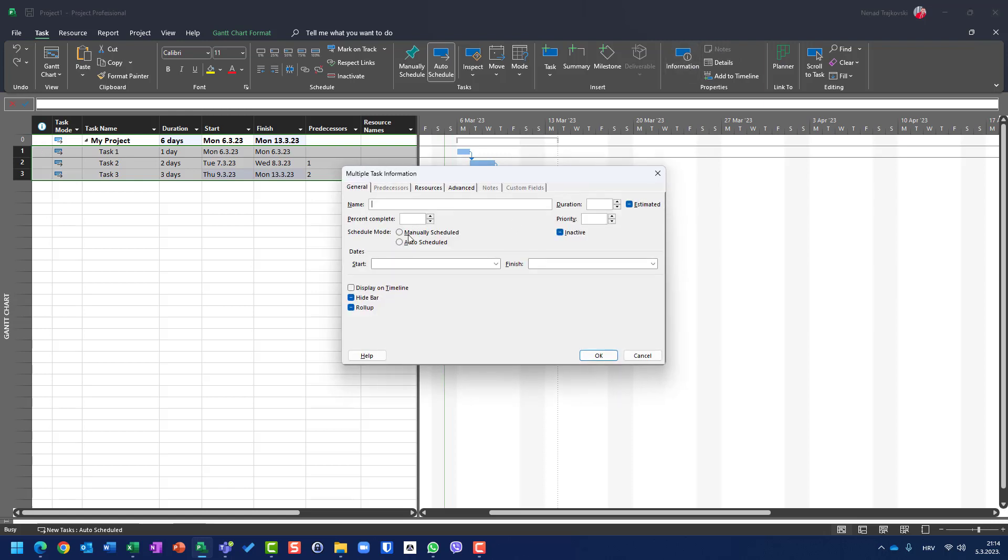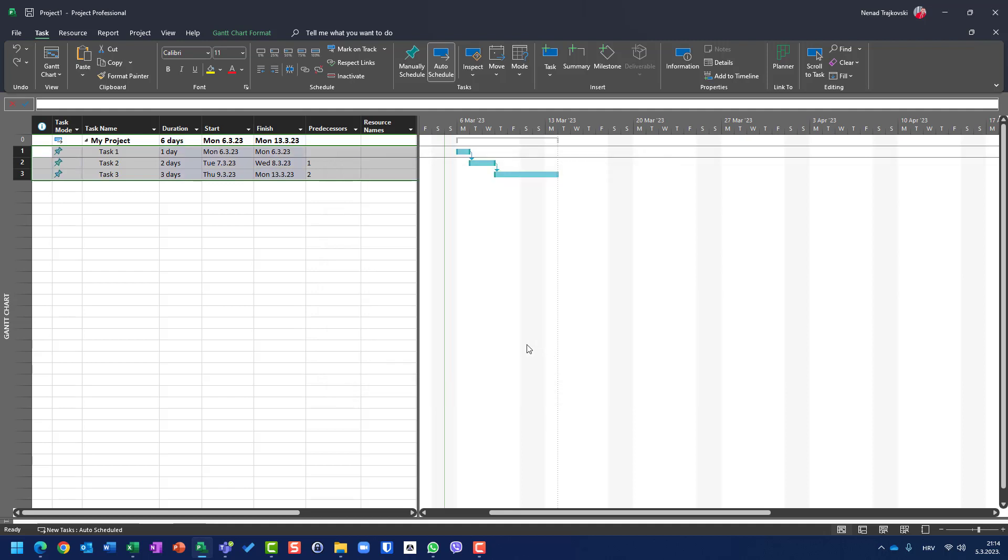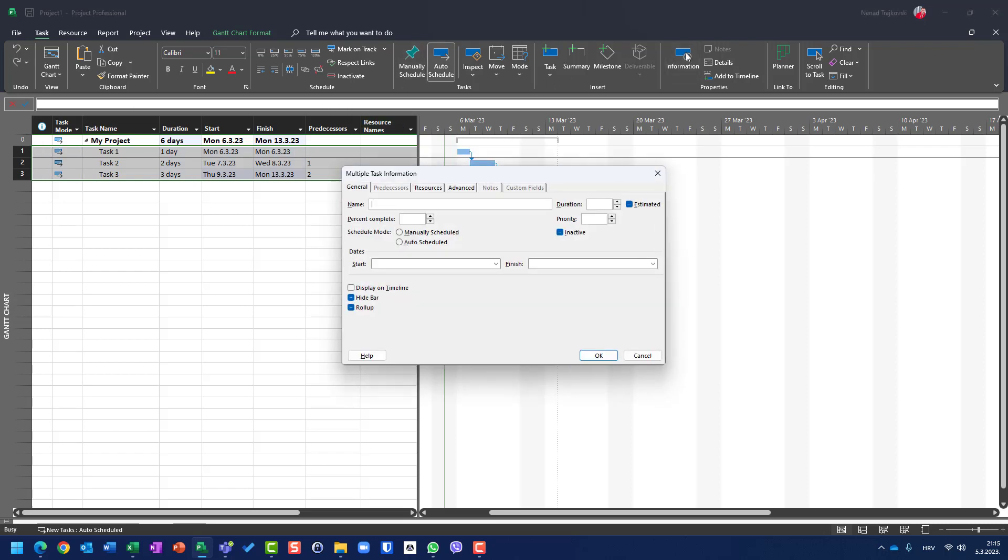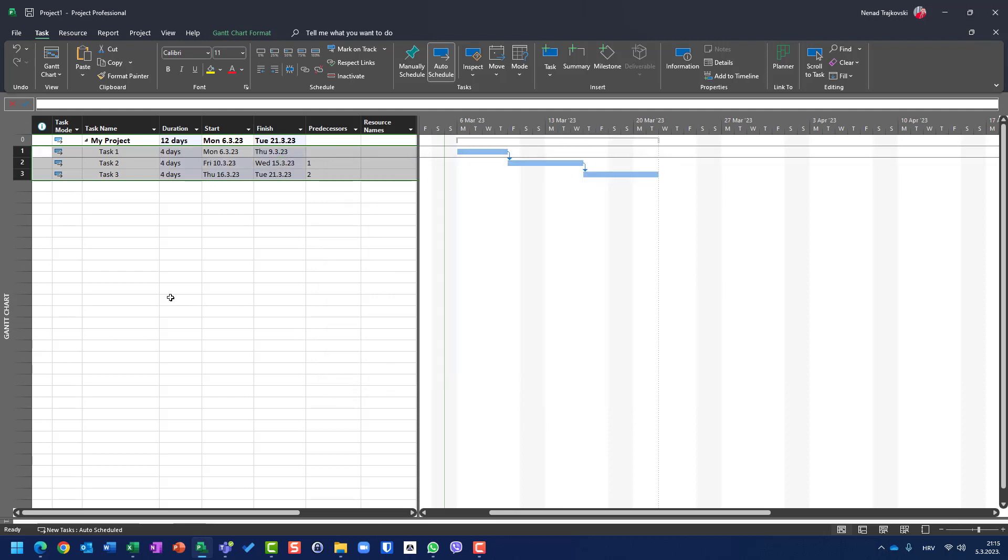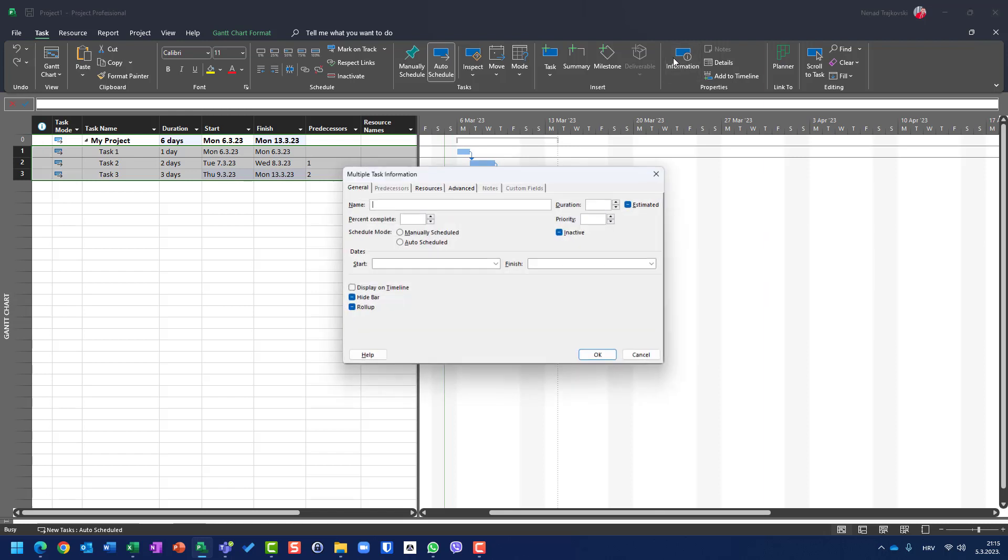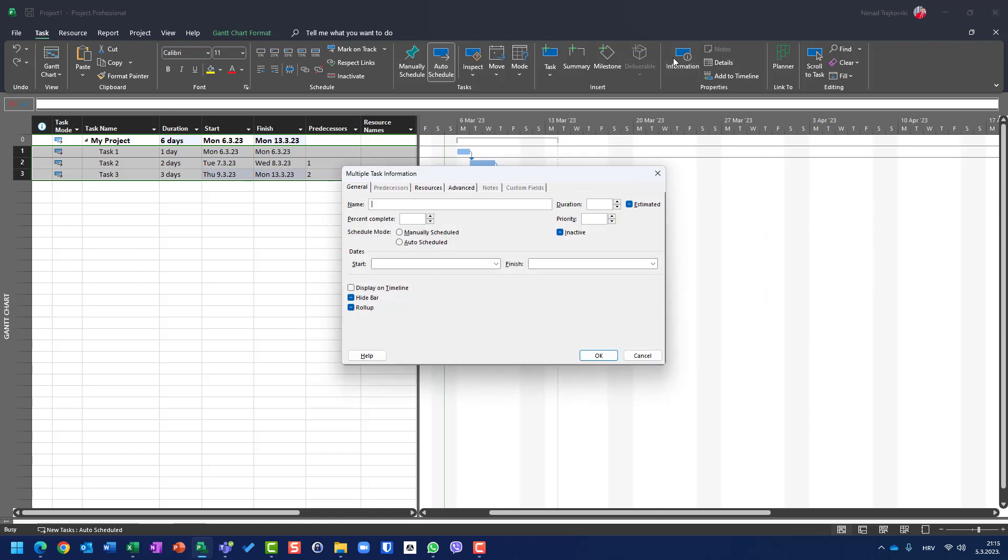I can change the mode in manual or auto schedule mode. So I can go to manual schedule and you will see all of them are going to be in manual schedule mode. Back to information. I can put duration. So let's say I want all three tasks, each and every of them to have, let's say, four days of duration. And I will put OK, here I have the same result. Undo it. And let's go back to information.